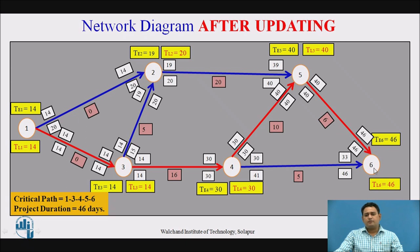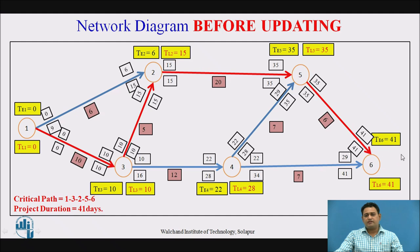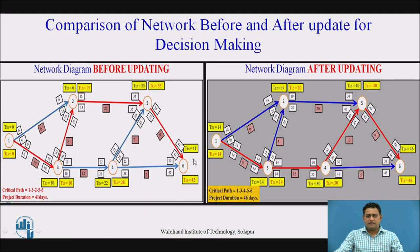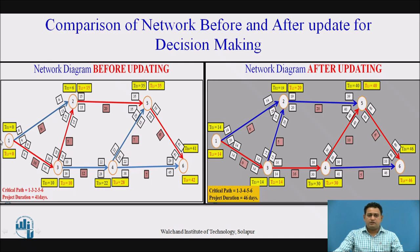After updating, the project duration is 46 days, which was initially 41 days before updating. Comparing the network diagrams, the critical path before updating was 1-3-2-5-6, and after updating it has changed to 1-3-4-5-6. The project duration increased from 41 to 46 days. Additionally, the initial event 1 had a starting time of 0 before updating, but after updating it is 14. These are the major differences between the network diagram before and after updating.